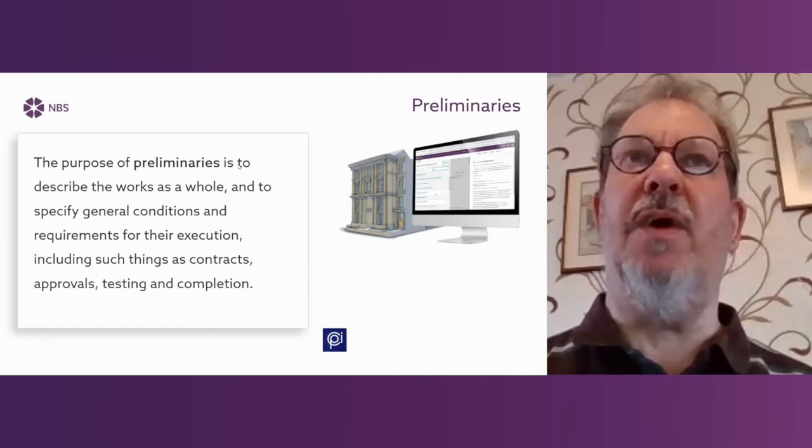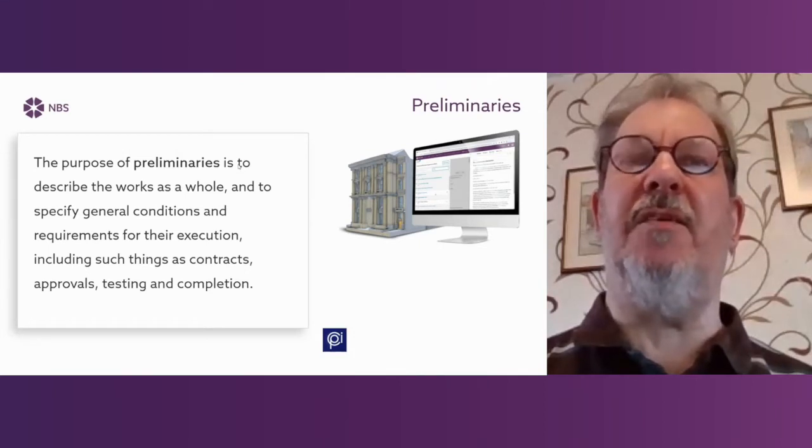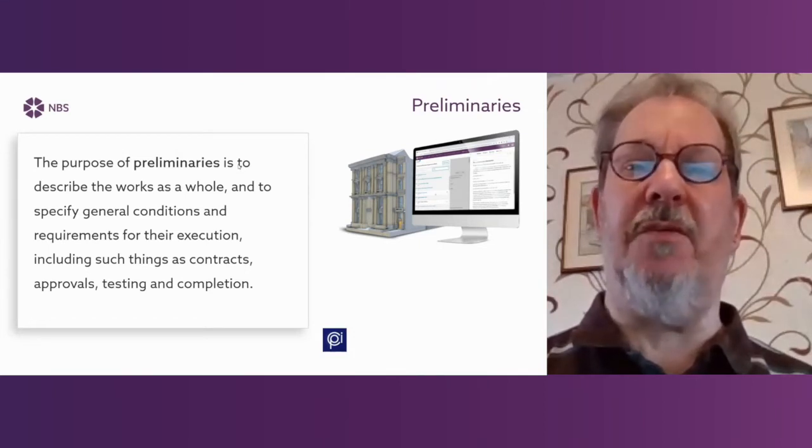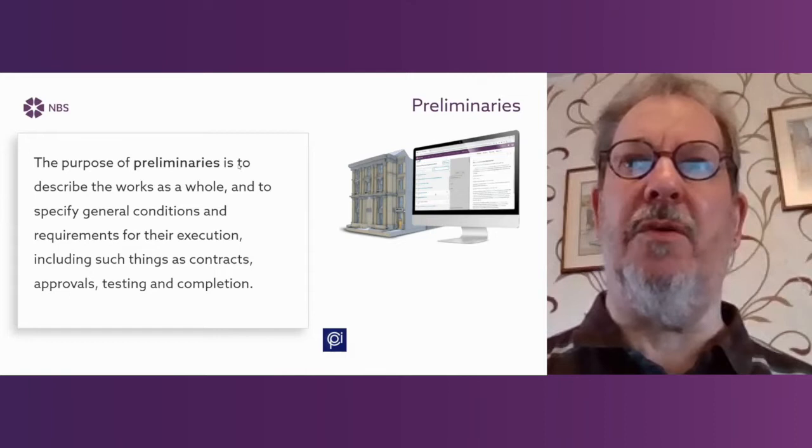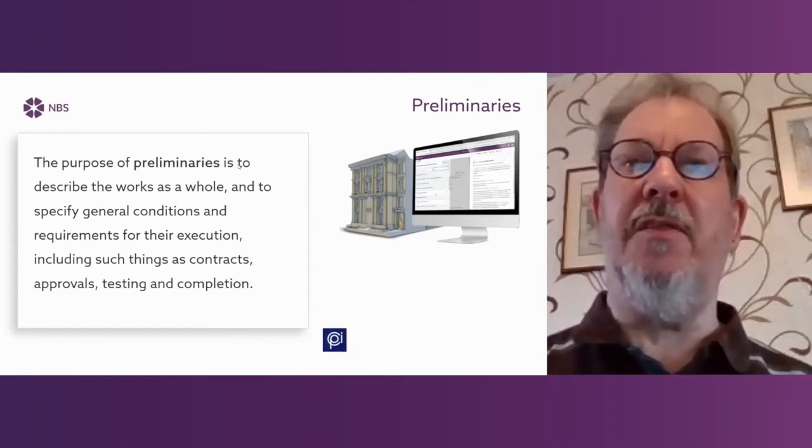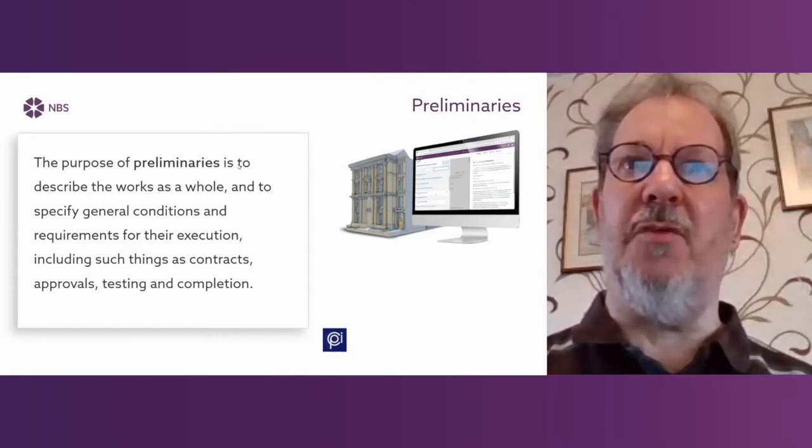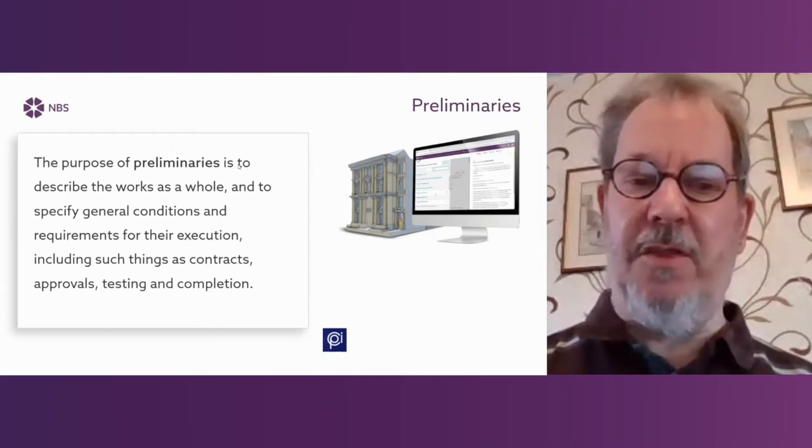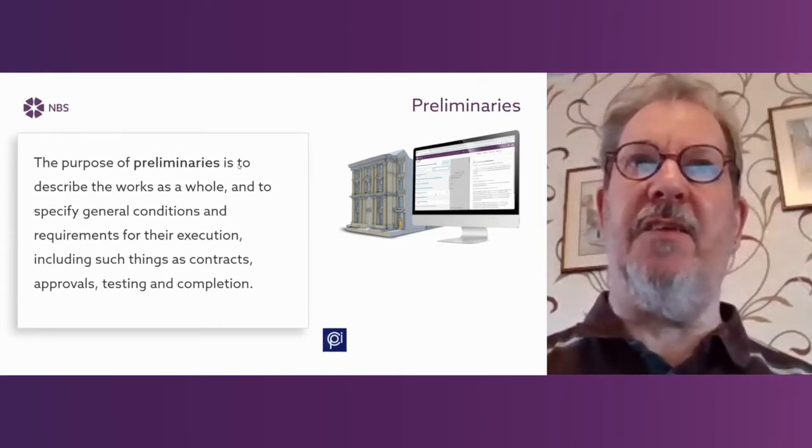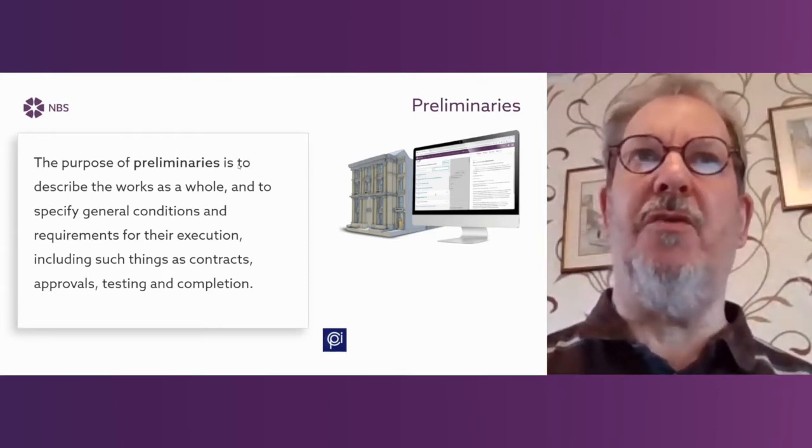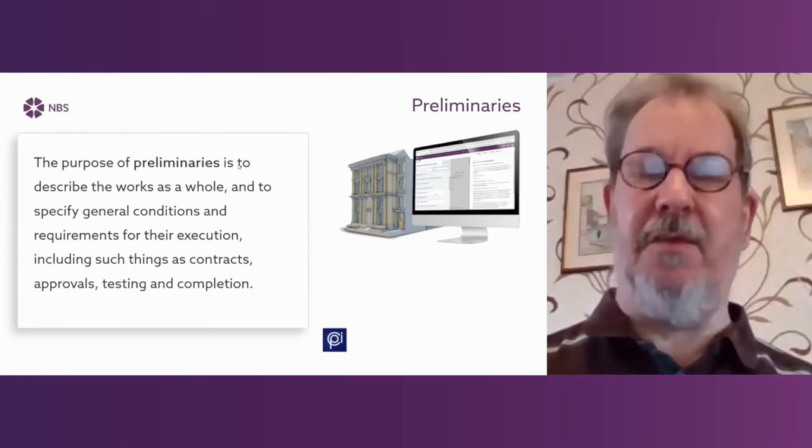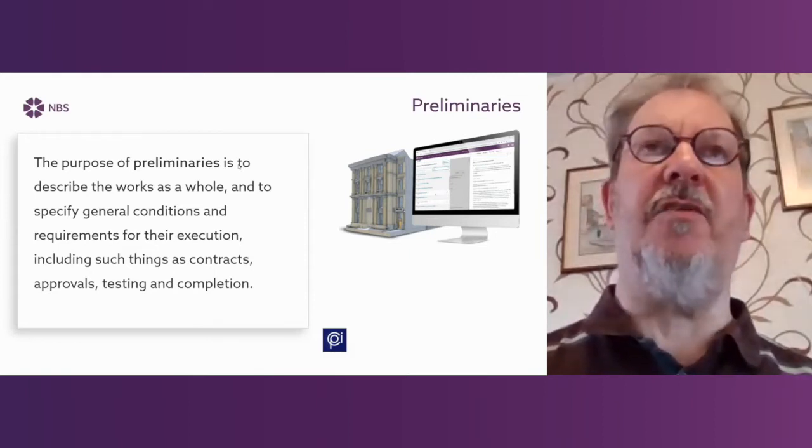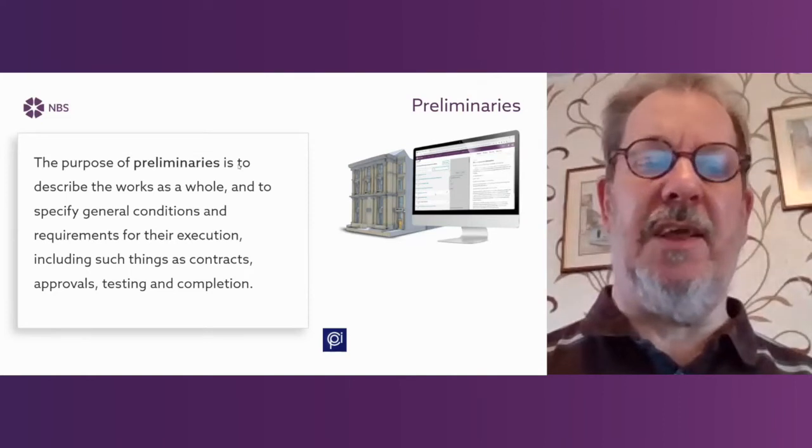So whereas we have the work sections which may describe certain elements of the work, such as brickwork or block work or roofing, the preliminaries element describes those things which apply to the whole of the job, particularly things like which contract are we going to use, where is the site, and what are the overarching requirements regarding standards and things like that.